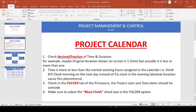The next issue to check is decimals and fractions in time and duration. It means that the duration shown on screen may not be the actual value. For example, if the original duration is 0.95 it may display as 1, or if it is 1.01 to 1.49 it will also show as 1 — but actually it is more than one. We have to make sure the duration is exactly what is shown on screen.